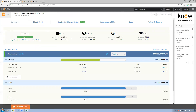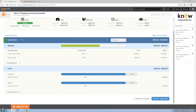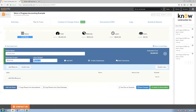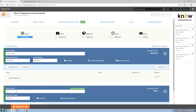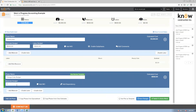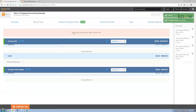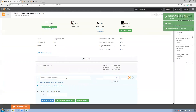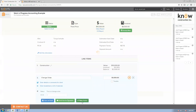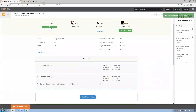She touched on the idea of change orders and adjusting your budget with the change order. You do have the ability to adjust your budget at any point in time, whether you want to adjust the existing budget or add a change order budget. If we're going to need to order $500 more materials, I can add a change order in my contract for $1,000. This will adjust all of my work in progress numbers as well. So I don't need to run any extra reports or set up a separate job — it's all built to handle this reporting. No workaround needed to set up a change order; it's all just part of Knowify.